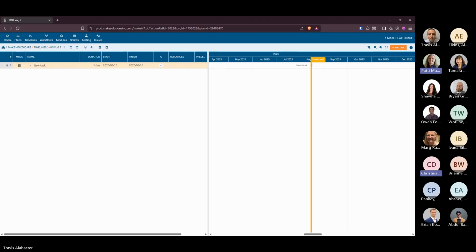And the other thing, Christina, if you have things in an Excel file, activities already loaded, if you right click the task there, you can also cut and paste in from a clipboard. So say you had a whole bunch of tasks already created in Excel. We can't bring in an Excel file as we bring in an MPP, but you can cut and paste from your Excel and then use that add task below from clipboard.